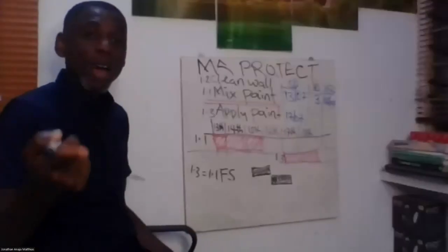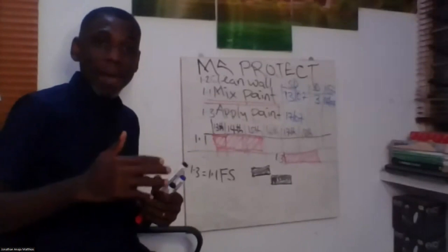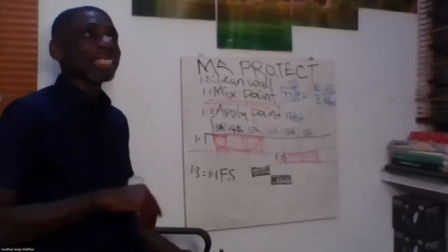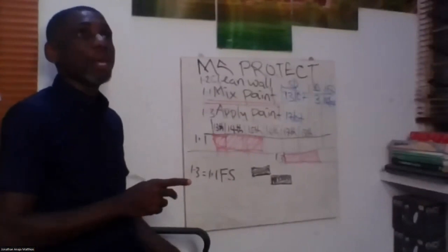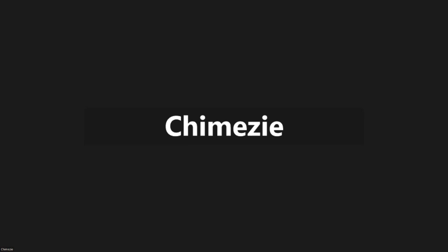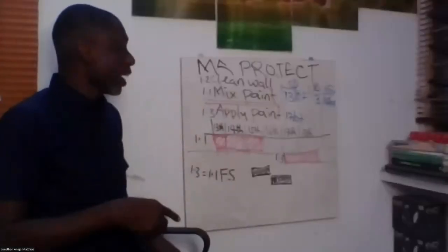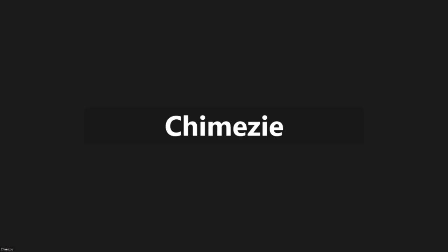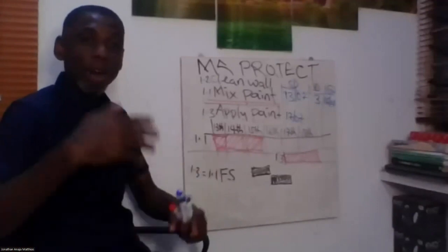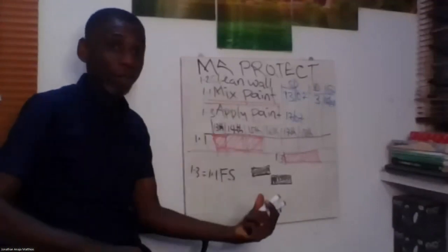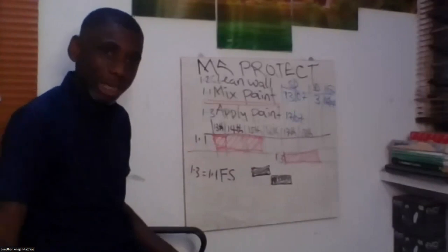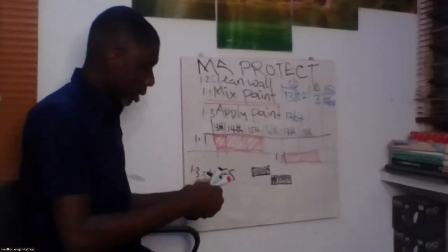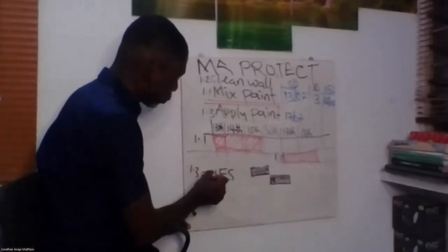Now, if I introduce a lead time, it means do I want to advance applying of paint a bit? This is applicable if maybe it's a very big building, for example, and it has maybe 6 sites. If they finish mixing paint enough for 1, 2, 3 sites, you can begin applying paint while they are still mixing the other part of the paint. That's where lead comes in. You now say, no, let me use a lead of maybe 2 days. Now, this is it.